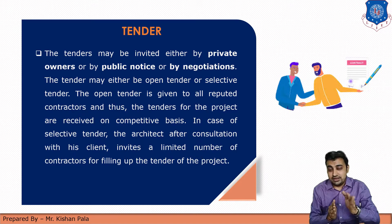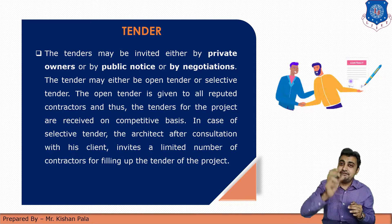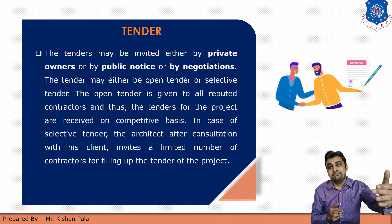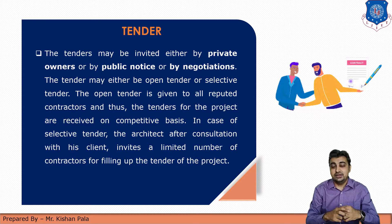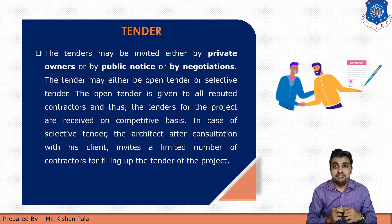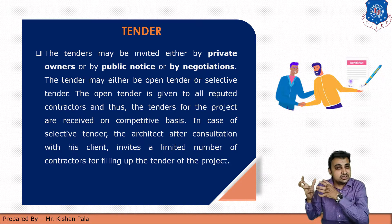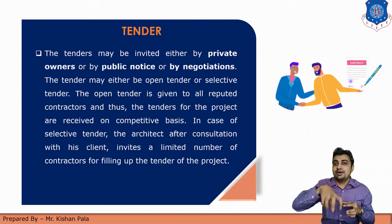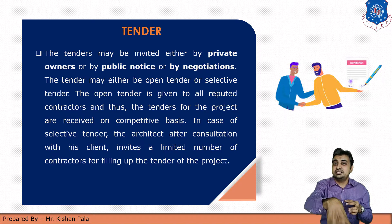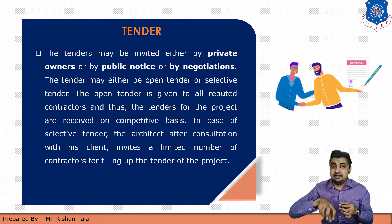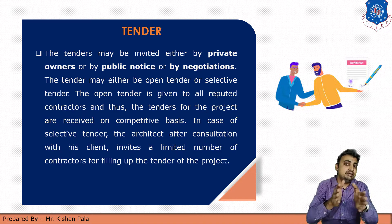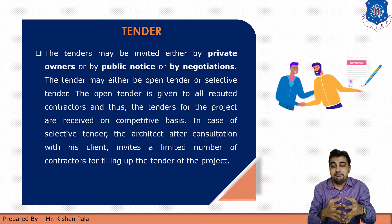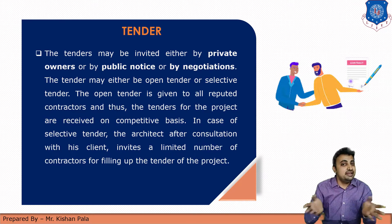In the third case, for example, you want to construct a specific skilled work — such as a Swaminarayan temple. In that case, skilled labor is required for that work, and there are only a few contractors working for that particular type of structure. You select one by negotiating with them one by one. So depending upon the work, the structure, and the requirements, the tender type may change.